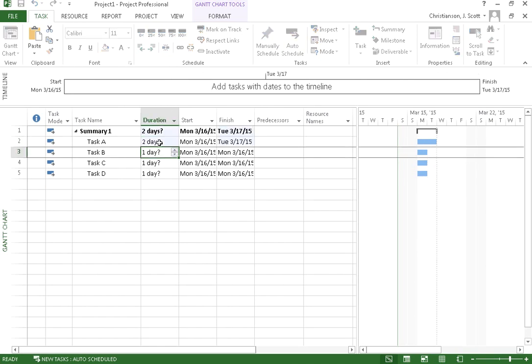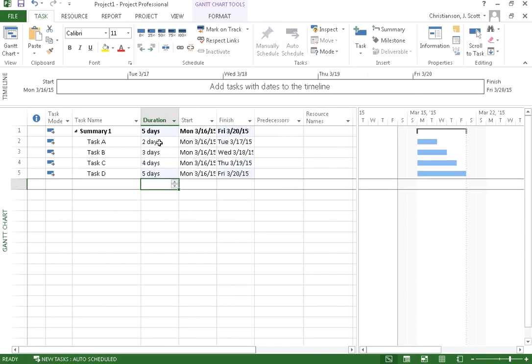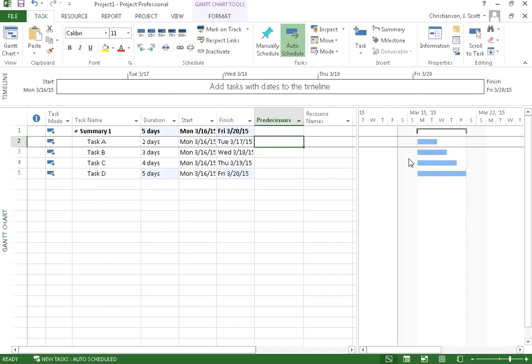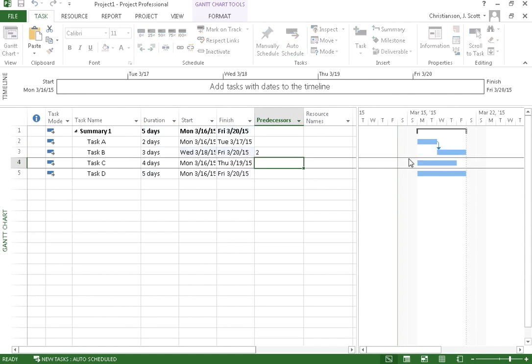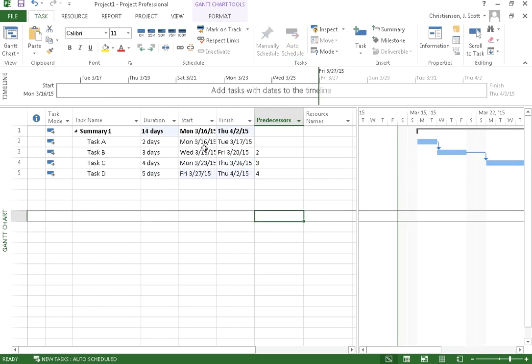So if I say this is 2 days, this is 3 days, this is 4 days, this is 5 days, and I happen to put in my predecessor information here, you'll notice it then summarizes and say, well, these groups of tasks here are going to take a total of 14 days.